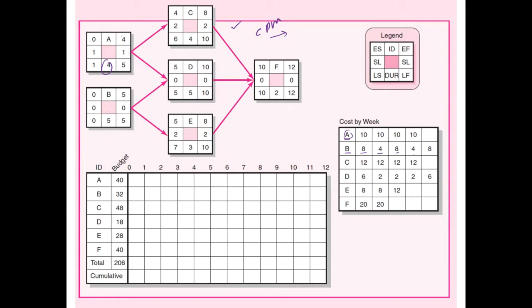So the first activity you can see based on the early start timings is activity A, which is starting from week 0 to week 4. So the budget release is based on this. So we would be receiving 10 grand for activity A during the first 4 weeks. The second activity we will target is activity B, which is also beginning right at the beginning, from 0 to week 5, and the budget is 84848.